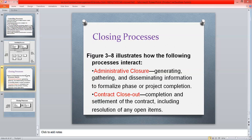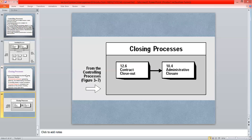Contract close-out means settlement of the contract including resolution of any open items, confirming the project is successfully implemented, and then officially closing out that project. We can do this contract close-out or administrative closure from the controlling processes. Thank you so much.